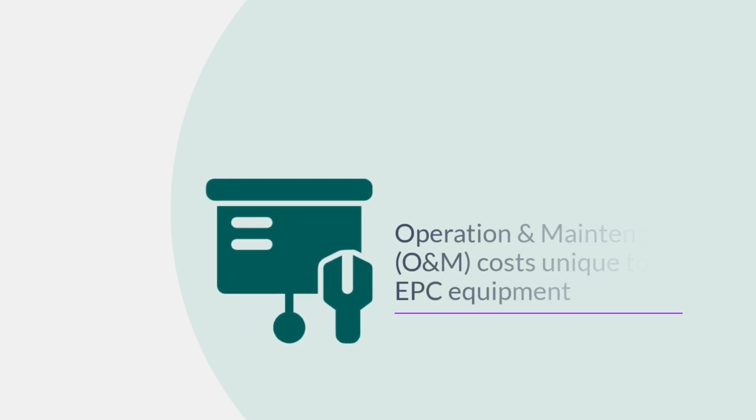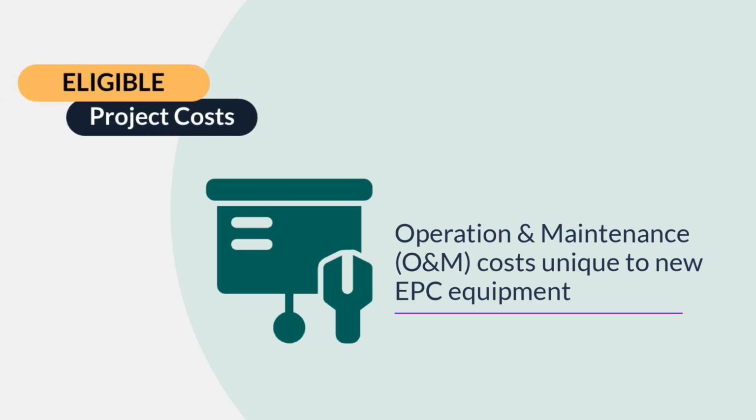Additionally, staff training costs directly related to the maintenance and operations of new equipment are eligible EPC project costs. Resident training related to the use of new technology and equipment is also an eligible EPC project cost.